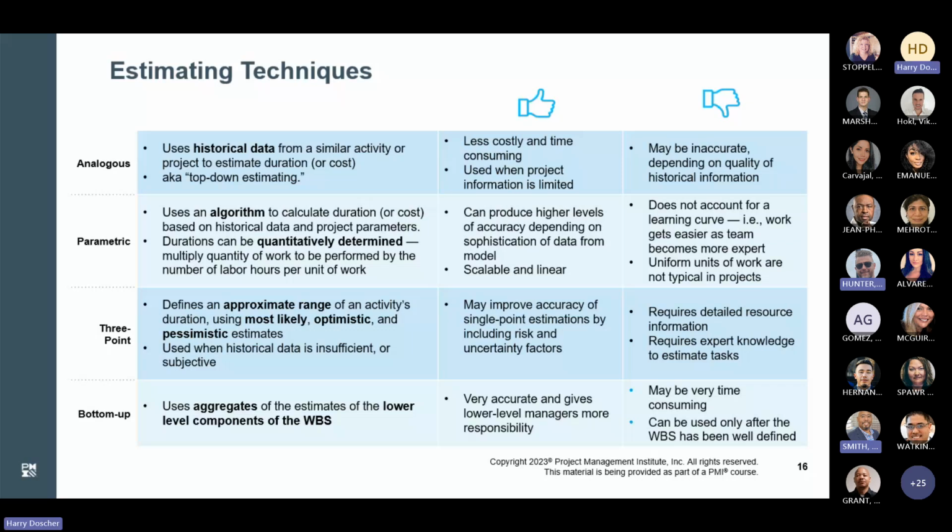So if you've got information for building 1 mile of road, and you've got a project that requires 10 miles of road to be delivered, you can extrapolate from the single one in the historic register and get some good estimates for your project.